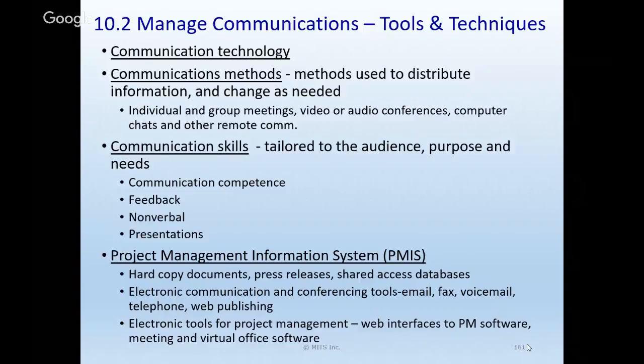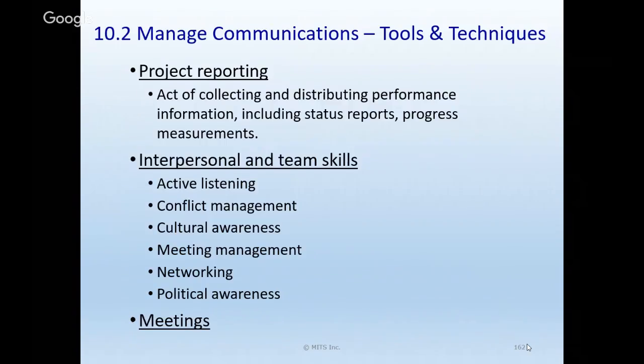And lots of different tools that we could use there. Project reporting, you know, we're collecting information and distributing the information on the status of our progress. So we'll be comparing plans versus actuals for our schedule and our cost, various factors like that.